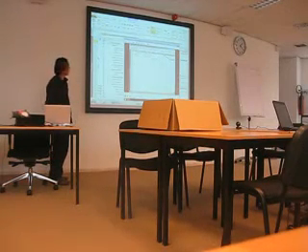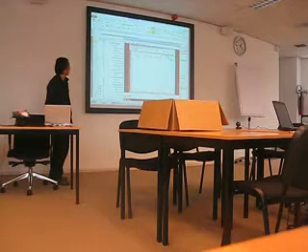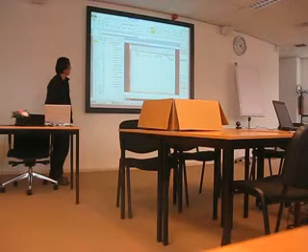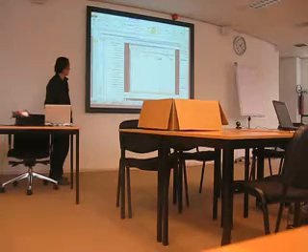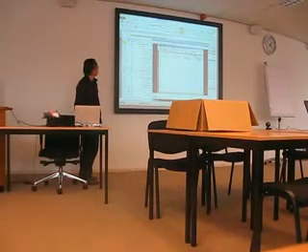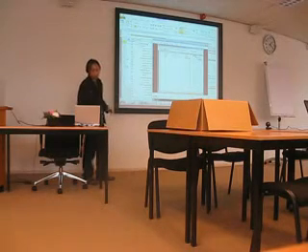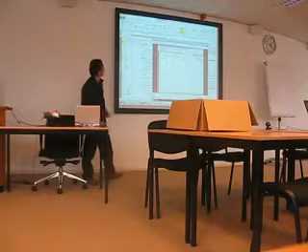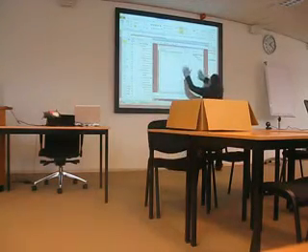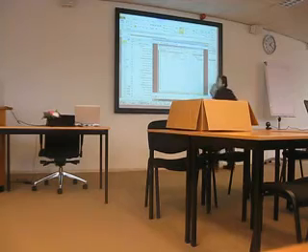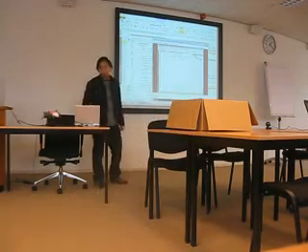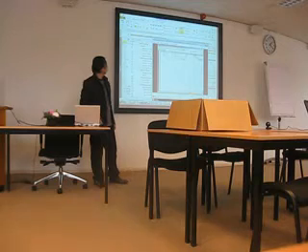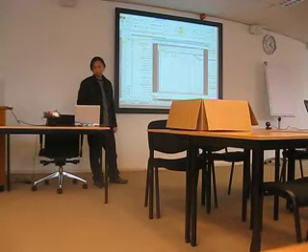Once the sync up is completed, the assignment of resources to the task immediately shows up in the Microsoft Project file. Let's go ahead and assign some tasks to some of the resources. And then use publish to publish the changes to the server. This is the Microsoft Project, and after that, we change or update to the server. Finish. Only like that.